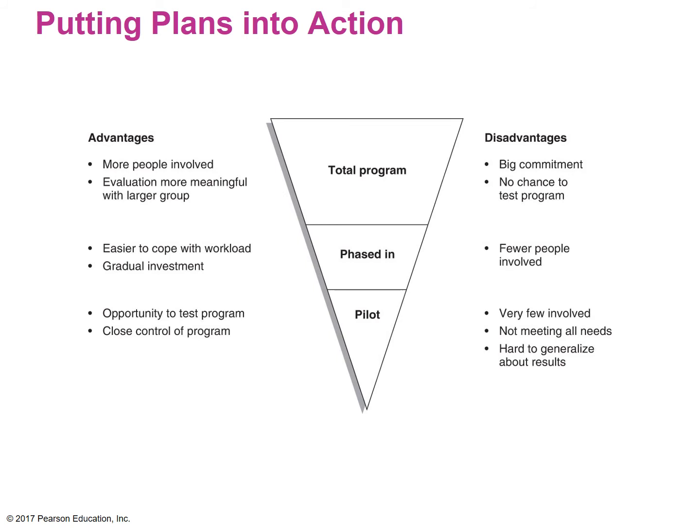Phased in, easier to cope with workload, right? Because the idea is that we're not addressing everybody early on. We're phasing it in to a smaller group. It's more manageable. Gradual investment, right? You're not dumping all your resources at day one. You're kind of feeding it in slowly. Fewer people involved, right? So when you phase in, not everyone's involved, so not everyone's going to receive a benefit.